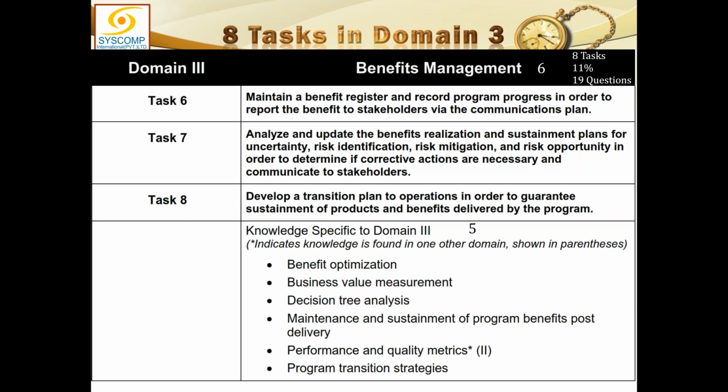So the general procedure has been told to me, and abiding by that procedure, I start creating these artifacts. And when all these artifacts are completed, the final version of that is my baseline. Exactly on the same parameter, we first create a benefit management plan.